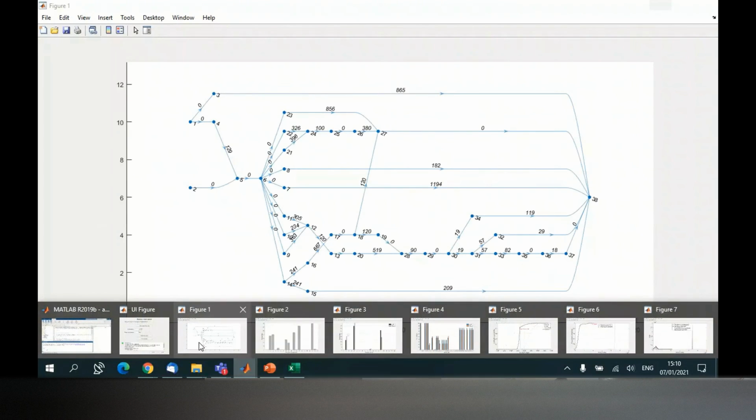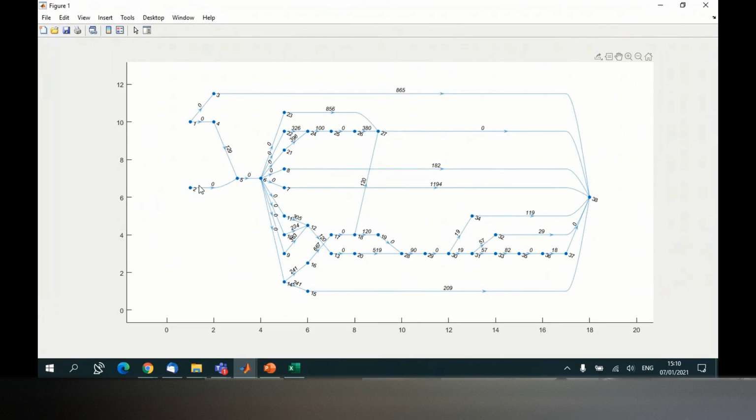Okay, that's a really good question. It's at the beginning of the project, but it's not on the critical path because probably your critical path can be this one in one iteration and this one in another iteration, so you are not passing through 2. It's just an independent activity that occurred at the beginning of the project, and it happened to be already executed because its duration is 0. So you are not going to pass through it. Whatever you do, you're going to start maybe with 1, but never with 2. All right, thanks. This is just the reason for it.